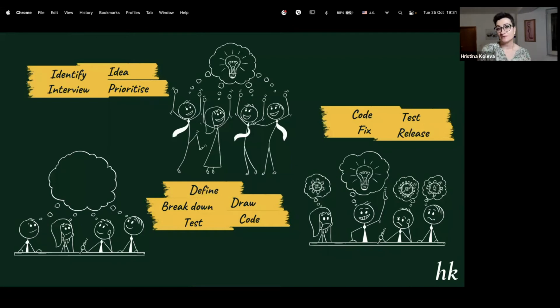Then the next step in my 3-phase development workflow: prioritize as a team, define as a team, and deliver as a team, is to sit together and write the user stories together. Product managers preparing requirements for a couple of weeks, then breaking it down into user stories, then trying to come up with acceptance criteria on their own is a bad practice. It never works well.